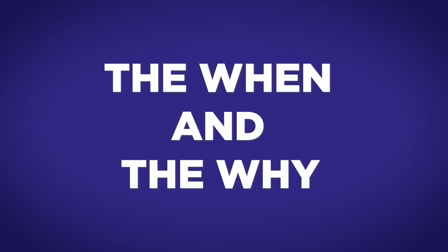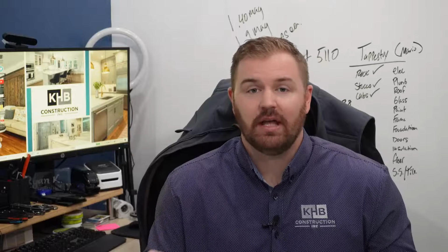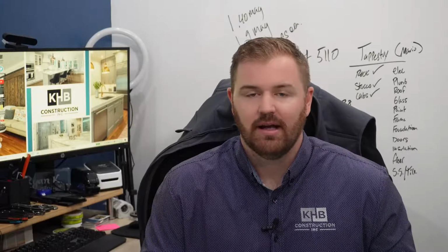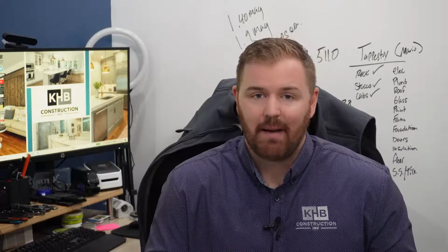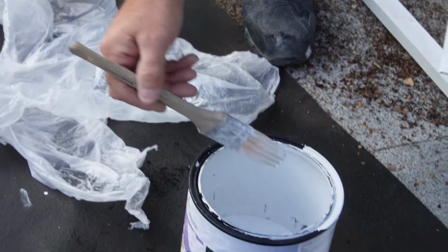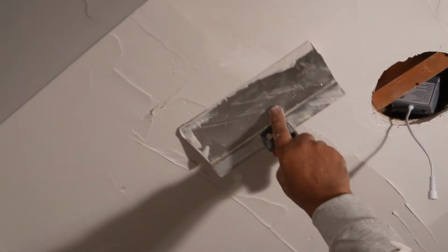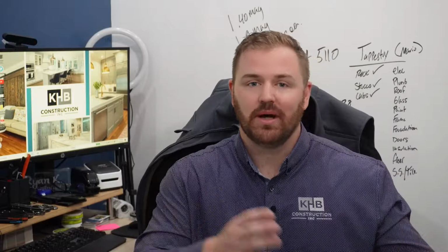When does a change order happen? Why does it happen? So a change order is a change to the original contractual scope of work for your contractor. And these happen way too often. Even here, we've had an influx of change orders happen recently, which spurred the thought for this video. And the why factor is the customer usually wants to do something different, color-wise, design-wise, hopefully not structurally. And those changes result in a change order.